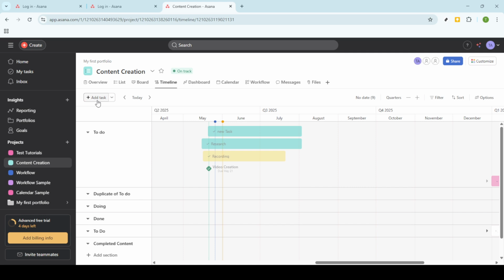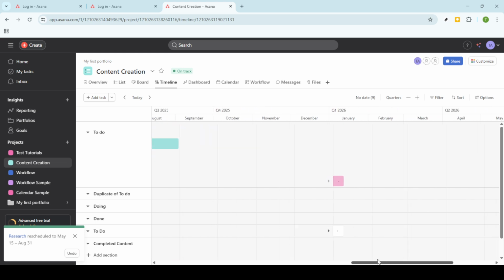Tasks with dependencies, meaning tasks that rely on the completion of others, are visually connected right on the timeline. Grey lines will represent non-conflicting dependencies, and this is your ideal scenario. However, if you spot a red line, that's a potential conflict, requiring a timely resolution to keep the project on track. Adding dependencies is straightforward. You can drag the connector between tasks, or opt for the Add Dependency option available to you. This flexibility ensures that your timeline remains representative of the true flow of your project sequence.